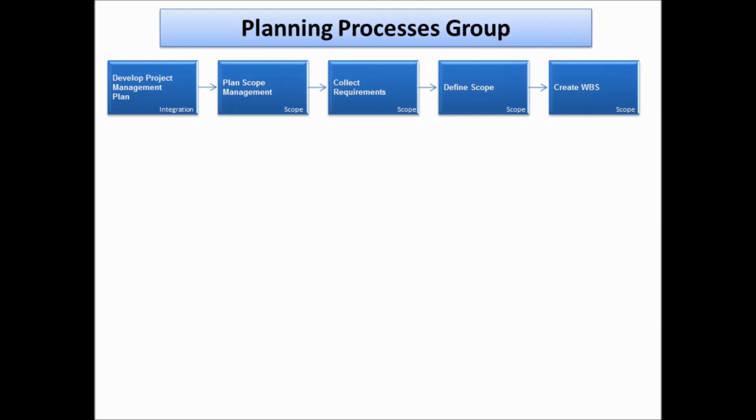So let me explain this WBS with a simple example of, let's say, building a house. Now, you can break it down into foundation, flooring, building the walls, roof, and other things, right? So again, we further break down the foundation into drawing a layout, digging a hole, pouring concrete, right? Now, here, concrete, which I just mentioned, will be the work package, which I just told you is the lowest level on the WBS.